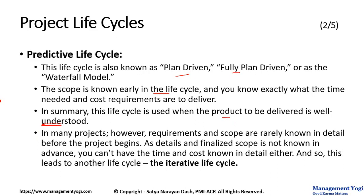In many projects, however, requirements and hence scope are rarely known in detail before the project begins. Not every time will you know all the requirements, and hence scope is not fully known. As detailed and final scope are not known in advance, you can't have the time and cost known in detail either. Because you don't know the scope, how can you fix the time or cost? This leads to another life cycle known as the Iterative Life Cycle.